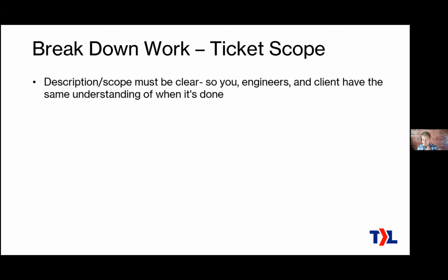Tips for making sure that the scope is clear. Okay, it's really important that the engineers and the client and you all have the same understanding of what it means for that ticket to be done. So what we've found as a good technique is just making a really simple checklist.